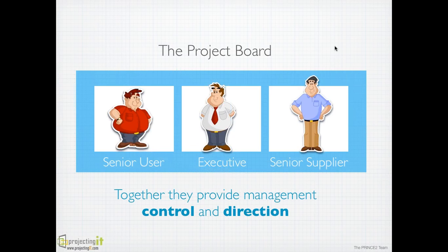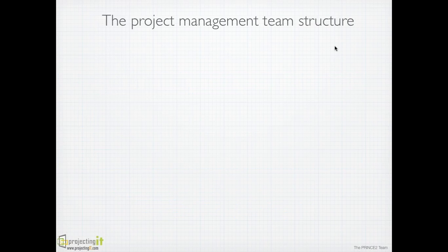The Prince2 process directing a project covers the activities of the project board and when those activities are to be done. The board is appointed at the time of starting up a project and initiating a project. Ideally, senior people who have authority to make decisions and commit resources should be appointed to the board roles. The board reports to the corporate or program management, and the project manager reports to the board. Let's see the other project management roles in the Prince2 team.